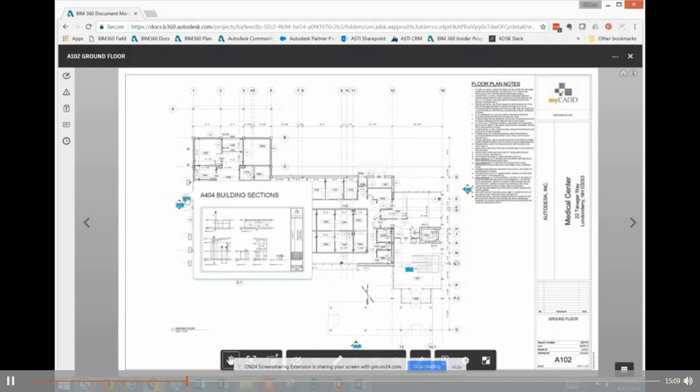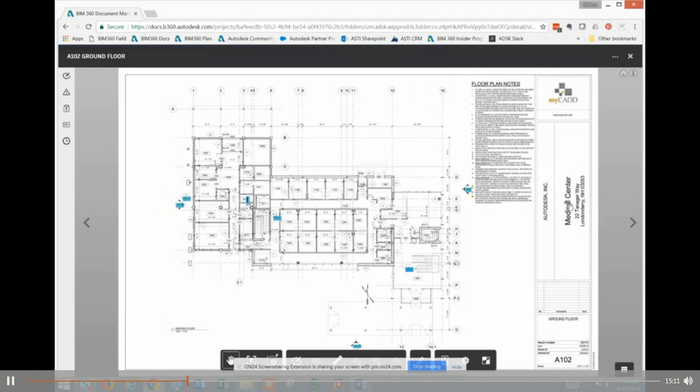So if our title block goes vertical like this, we can actually capture that information with no problems. And they are matching off of sheet name only. So the algorithm used to match off of both the sheet name and the sheet number. So those two had to match in order for it to version properly.